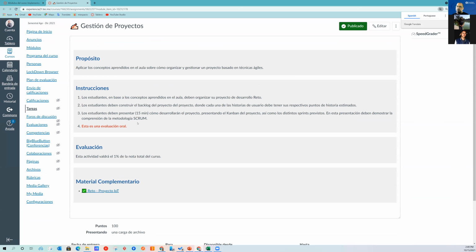What I want you to do is go to Jira, create the project, and create the user story, the user story that you worked on in the other lab. You generate the lab report, but you insert this user story in Jira. Okay, you create the product backlog in Jira.